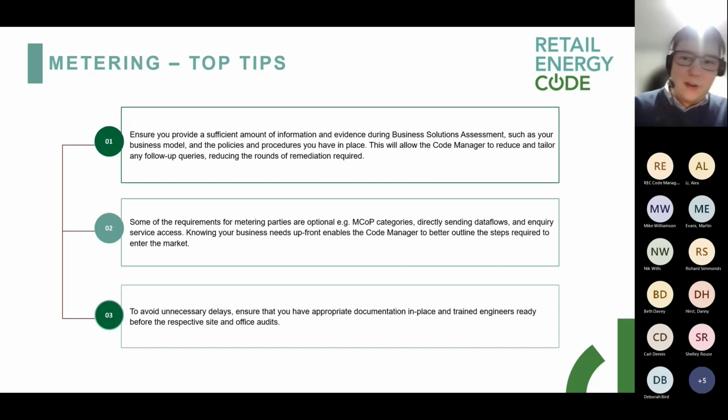And again, on the MOCOP side, there's a 3-month window between when you complete the HQ audits and when you have to complete the site audits. So again, it's just a case of being aware and being prepared for what the market entry requirements are, so you can ensure that you'll be able to meet them.